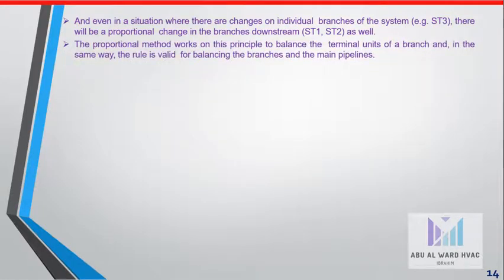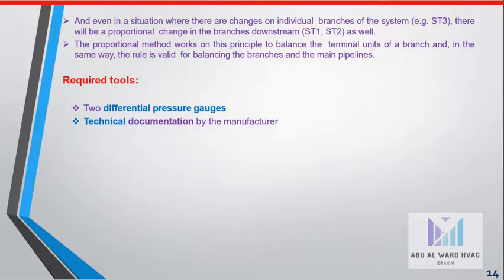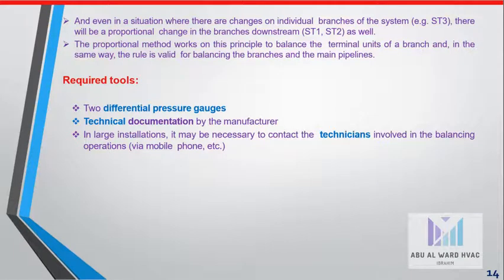The proportional method works on this principle to balance the terminal units of a branch, and in the same way the rule is valid for balancing the branches and main pipelines. Required tools: differential pressure gauges, technical documentation by the manufacturer, enlarged installation, and technicians may need to communicate through mobiles. The balancing procedure has mainly three stages.